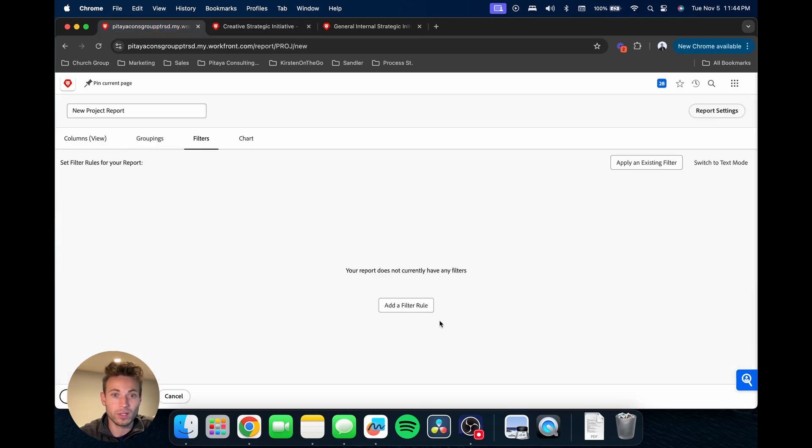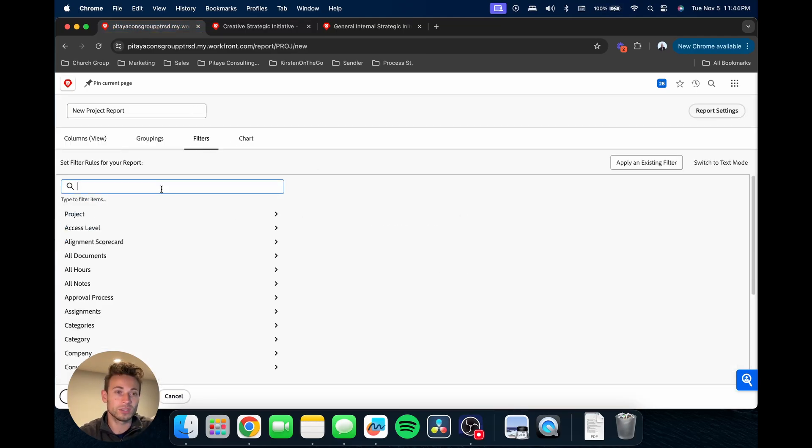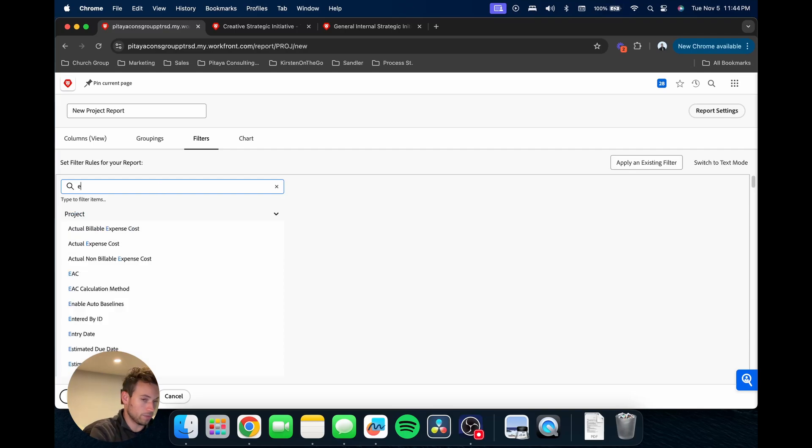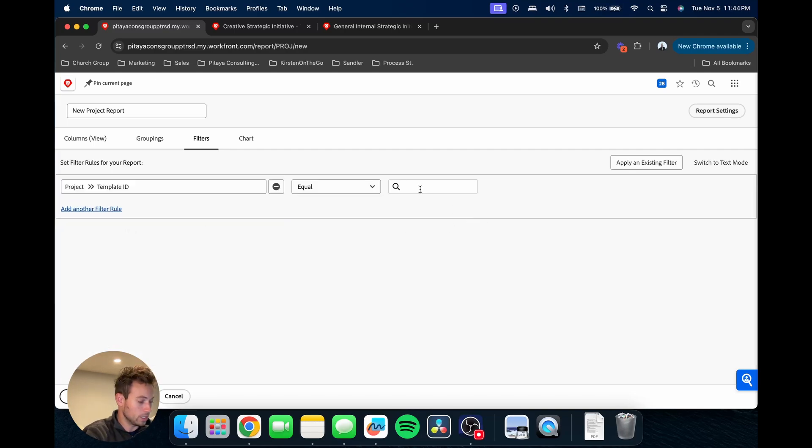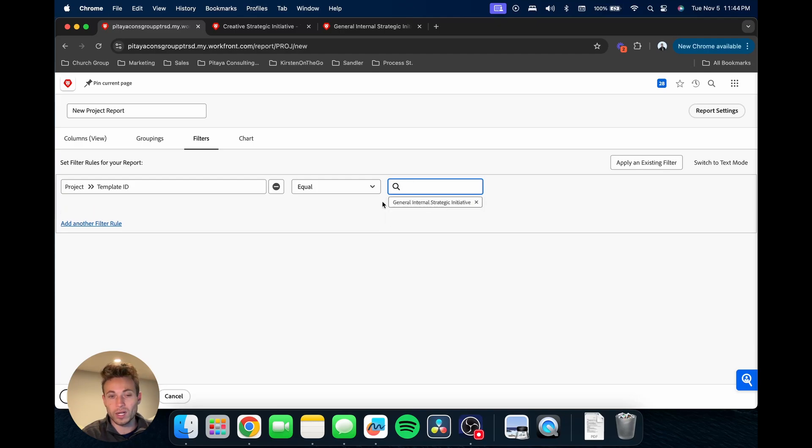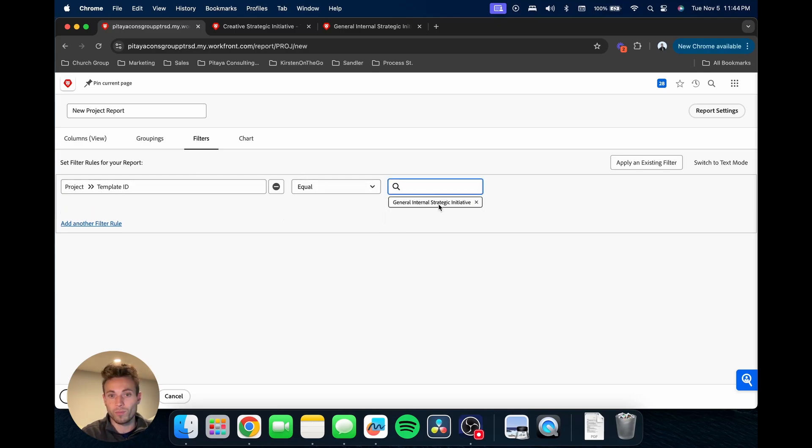We're going to get started by adding some filters. Our first filter is going to be our project template ID. Basically what we're saying here is you only want to bring in projects that have been created from this template.